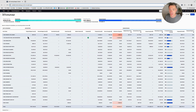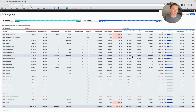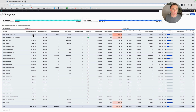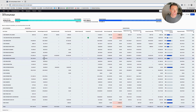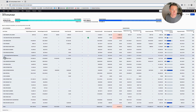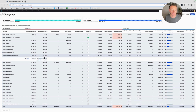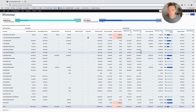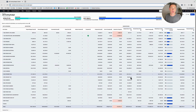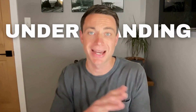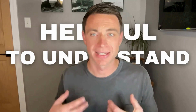I have a separate video that dives into the intricacies of job costing for an open book project — definitely check that out. Change orders are still really useful: they help inform the revised budget. At any given time, the original budget stays locked, but selections and change orders update the revised budget. For example, Rough Electrical has a selection and a change order that increase the total revised budget and show the revised price. I do wish Buildertrend would show a revised price versus owner price side by side — they don't currently, but that would be nice. You then invoice as incurred, and I have a video on that as well.